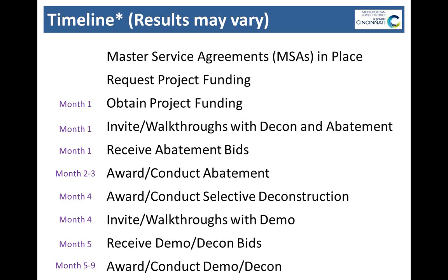That was this past month. One, as it's listed there, was May of 2013, so last year. And we just completed the final demolitions just in January of this year. There were multiple steps in that process, so if you take nothing else away from this slide, take away that it's not just a matter of getting funding and then knocking buildings down. There are lots of steps that are required in between, permitting and other things that have to take place.